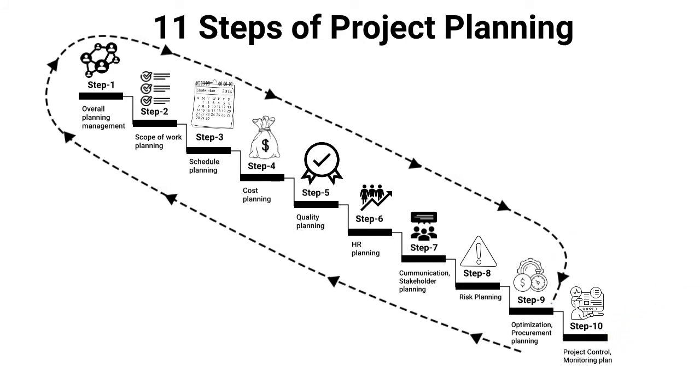In the second last step, project control activities are planned. This step is to finalize how to execute and control different parts of the project plan. Here the team ensures to develop a realistic project management plan and performance measurement baseline. Also, in this step, formal approval of the plan is taken.